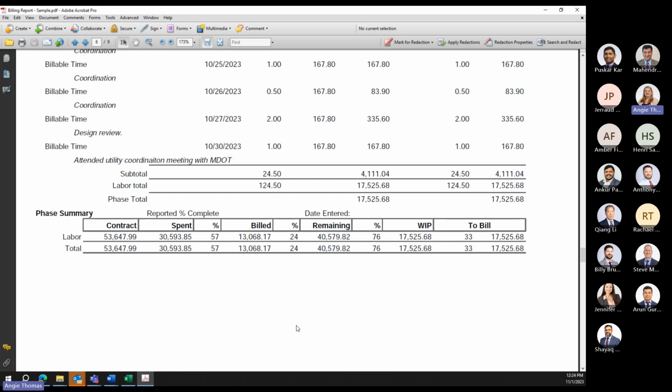I've been trying to keep up with that a little bit too recently. If I go into a job and I see that a phase is over budget, I've been putting that phase on work hold, just so nobody charges to it anymore. But there are a lot of them that are over budget.